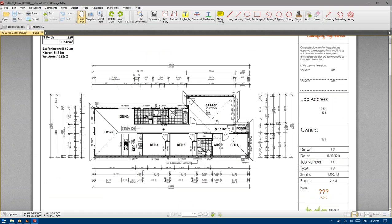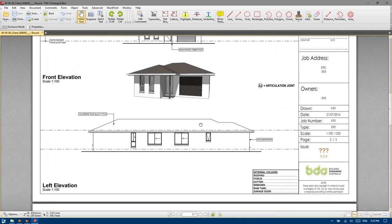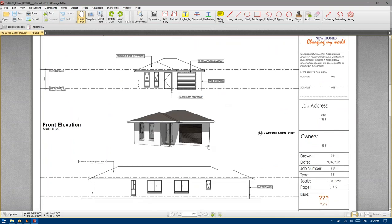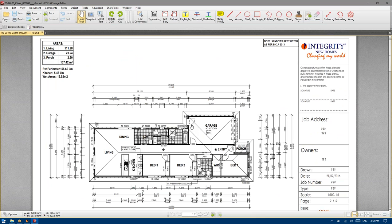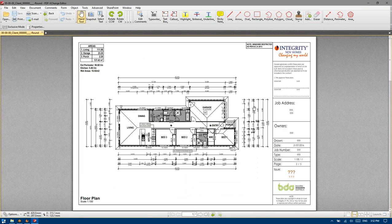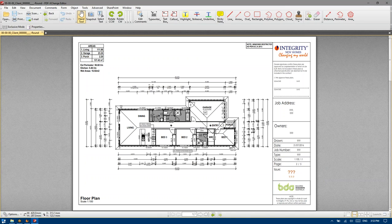It is something that we do internally, which is actually part of our template now. We were finding it was worthwhile getting our final construction set of plans signed by clients prior to actually starting construction. Some builders attending this training may take a different approach to colour selection and finalisation of plans and may do many of those selections pre-contract. We take a different approach — we just want to try and get them in the door and secure them and get them invested without actually tying up too much of our own resources.